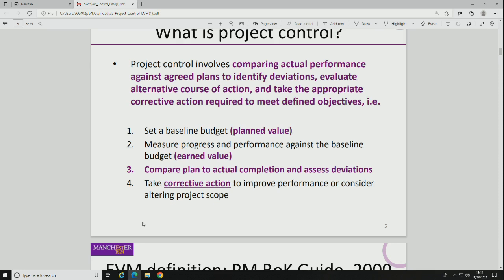You can track them in terms of the duration of the activity and the amount of resource which is on that activity. So we could do that as a detailed estimate, 20 days, two people a day, simple thing like that. You could work out how much money we said we'd spend, and we could break it down. We could say, well, we're going to spend so much on procuring materials in December. On December the 10th, we'll receive that, so we'll spend then. And so on. So we've got real detailed information about our resource consumption, as much as possible. And we've got our finance system saying how much was spent as well. But that's not the full picture, because that's actual cost and budgeted cost of work scheduled.